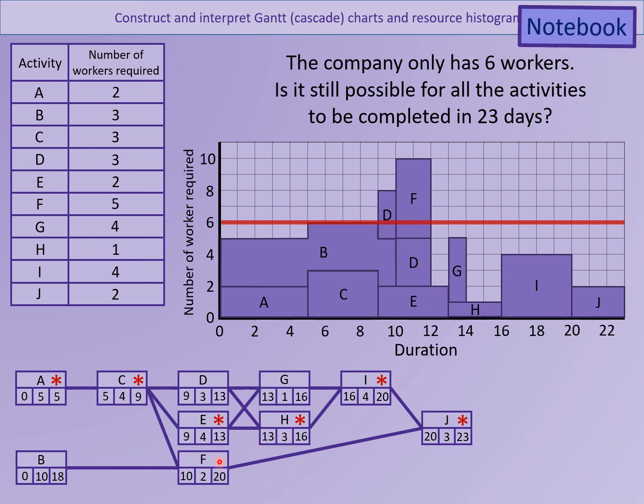Now, if I look at this, just thinking about moving it, I could definitely move maybe D across a bit, and then a bit of F will float down. I could move D across so it falls down here. F's a bit of a problem, but what I could do is maybe push F further along and then G further along, because I noticed that G has to happen after D, but it doesn't have to happen after F though. In fact, F can be finished later on. You can take F if you want to and chuck it in there. That would work, wouldn't it?